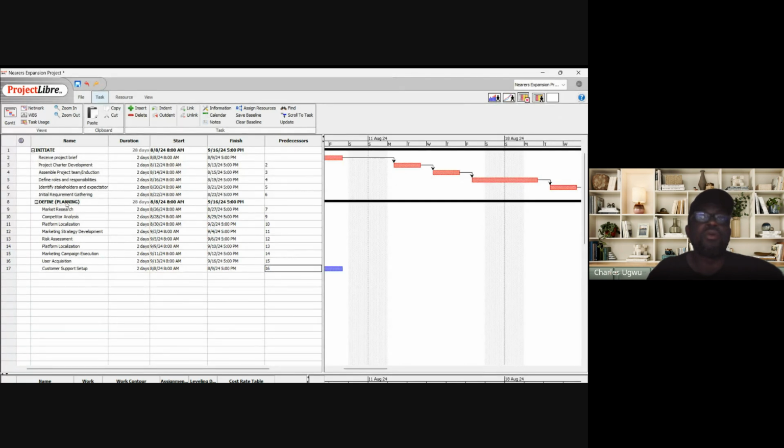So we can't assign anything under this. So you see that all the activities in this, all the tasks you can see here, all the activities will have 2 days, every activity. And when we sum it up, we come here, you see 28 days under this stage. Are you getting it?